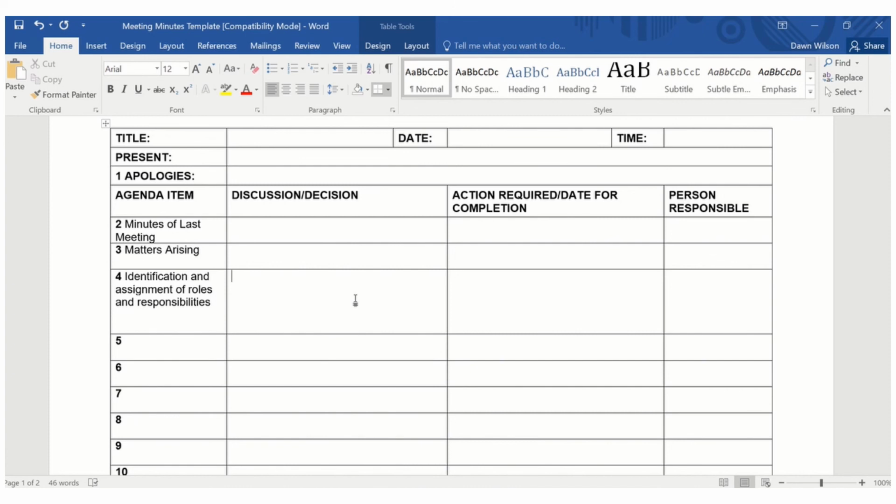As the minute taker, when you put those minutes out for review, put a deadline on it for when you have to get responses by. If you've not had any responses by a particular deadline, then you can assume that those minutes are final, and that will form your finalised minutes for the meeting.